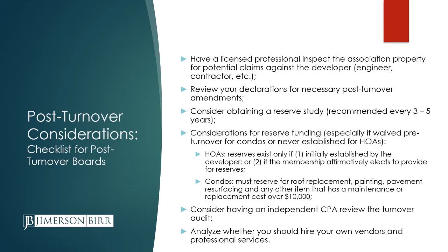So they may be latent and they might not appear for many years. You've got 10 years essentially from turnover in order to bring a claim. Well, you've got 4 years after discovery of the defects. But even if the defects aren't discovered in that 10 years, 10 years is the maximum amount of time that you have to bring a claim.